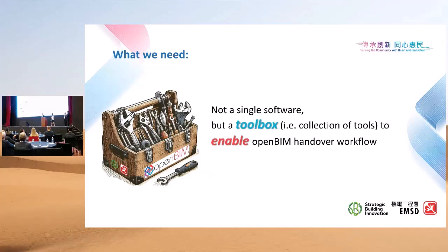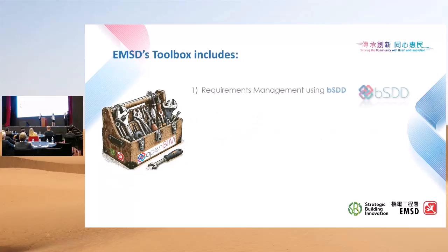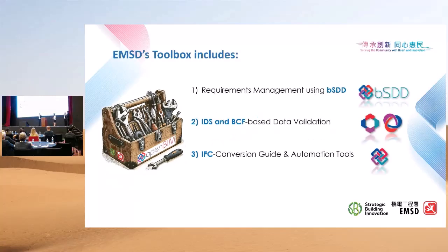So what we did is a toolbox of solutions. Our toolbox leveraged 4 openBIM standards, which are bSDD, IDS, BCF, and also IFC. This toolbox includes the first and the largest public dictionary in Hong Kong, which could save 90% of time for us when there's an update of the requirement.